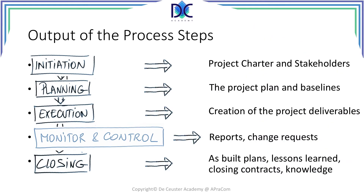What are the outputs of these process steps? First of all, the initiation relates to the project charter and the stakeholders. At the end of this step we will have a charter and we have identified the stakeholders. Planning is the next step of the process, and in this step we prepare the project plan and create the project baselines.